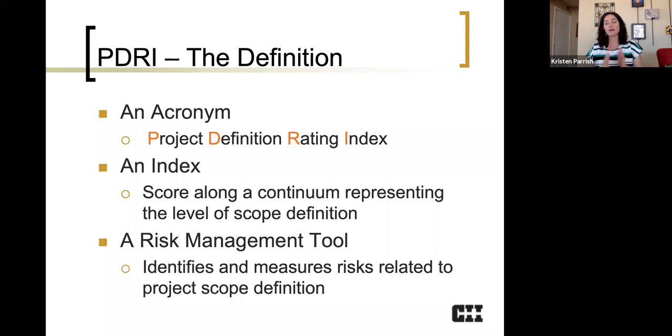So this means we are scoring along a continuum, and that continuum represents the level of scope definition, with zero, the lowest possible score being the best, and 1,000, the highest possible score being worst. So it's a risk management tool. The idea of PDRI is to provide a structured, comprehensive checklist that identifies and measures risks related to project scope definition.